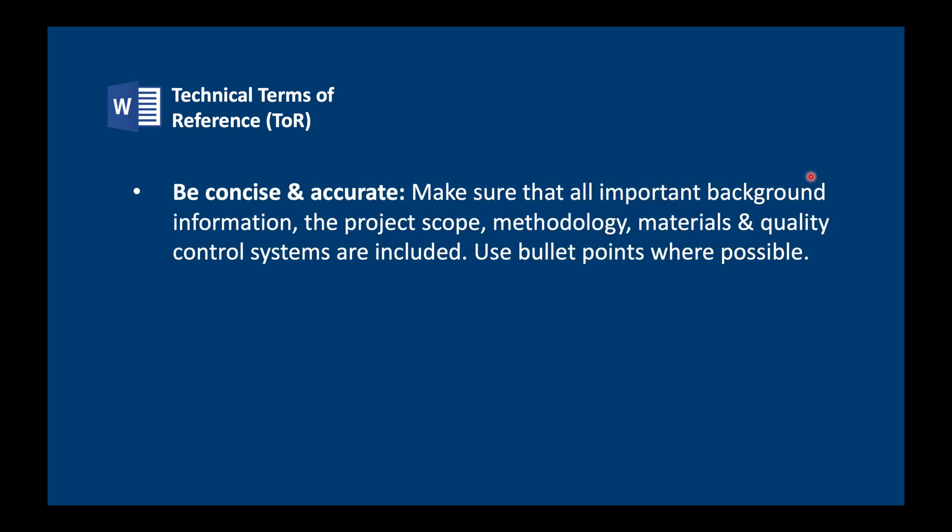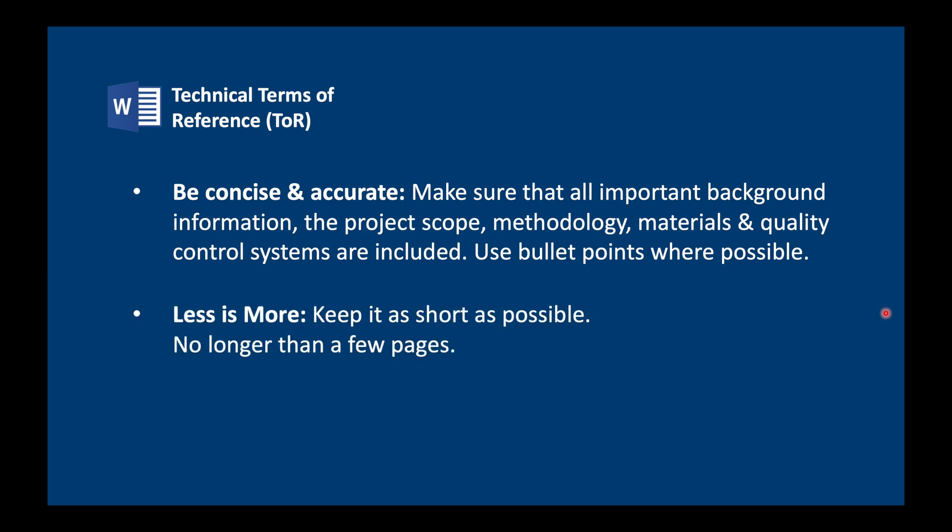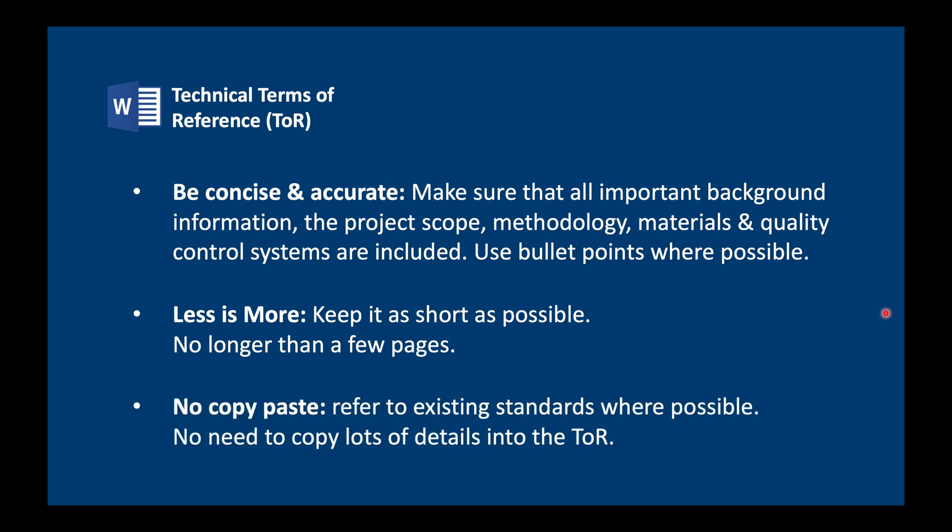Here are some general remarks. Be as concise and accurate as you can. Make sure that all important background information is included — project scope, methodology, materials, quality control systems and so on. Use bullet points where possible. Less is more, as I often say — keep it as short as possible, preferably no longer than a few pages. Don't copy-paste. Refer to existing standards wherever possible; you don't need lots of detail in the TOR if you can point to an existing standard.